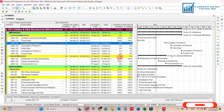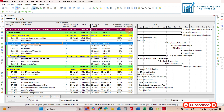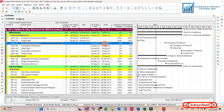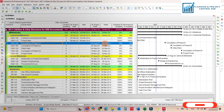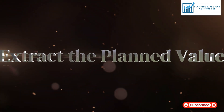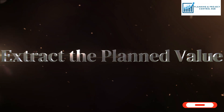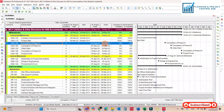I have already opened a file for which I want to make the S-curve. This project is already ongoing — you can see the physical percent complete and the performance percent complete. Now, how to make the S-curve — follow my steps. First of all, we check the data date up to which the project is updated. It is updated up to 7 July. For the S-curve we take the plan value, and for actual progress we take the earned value. We are assuming we are making the cost-based S-curve. For the plan value, come here to the Activity Usage Spreadsheet.